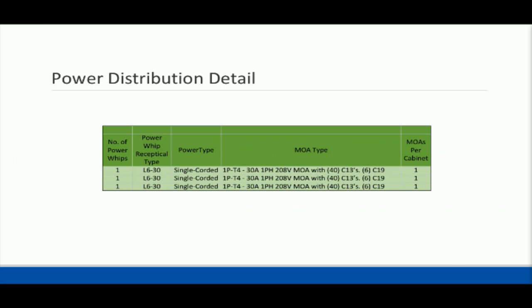Same thing on PDUs, those units that go into the cabinets. They're not all the same either. There are many different varieties and many different layouts. Most of you probably don't know this, but most of the big rack PDU manufacturers, or MOA as it's called here, multiple outlet appliance, will actually custom build those. So if you have a particular configuration where you're not getting the right count of plugs and you're going to build 50 or 100 of those, they'll build custom PDUs for you, and they will even go through the UL certification process for numbers on that scale.